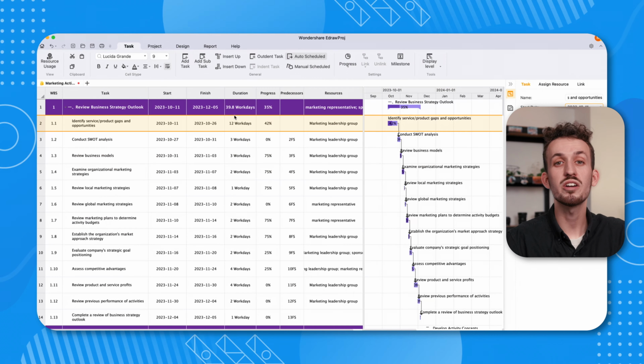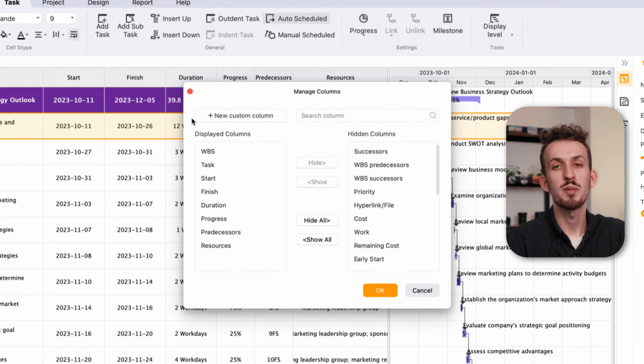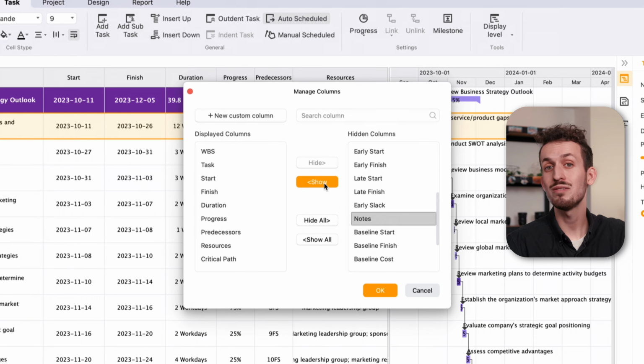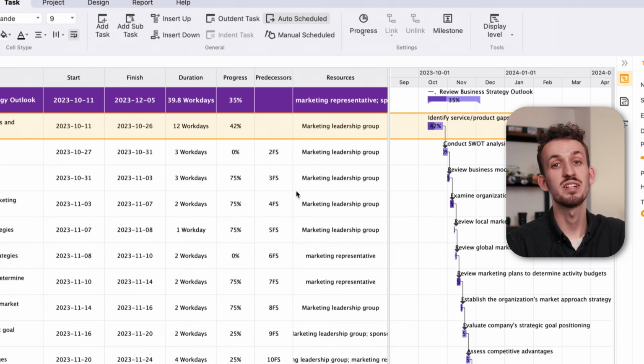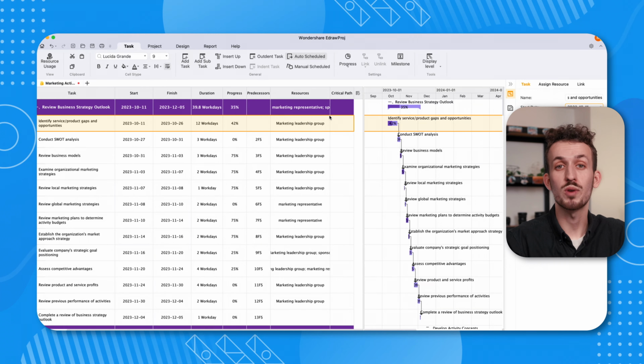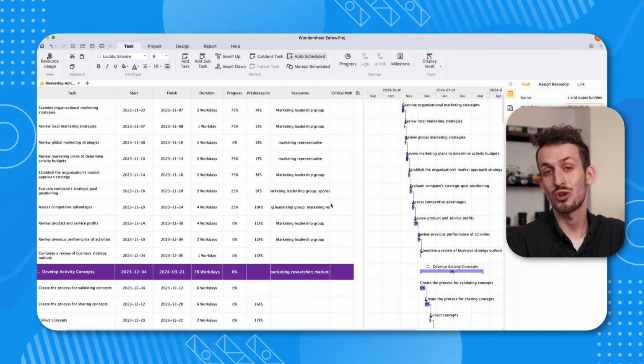Step 1. Right-click on the menu bar of the progress sheet and select the Manage Column option from the list. Step 2. You will get a small pop-up screen from where you will find several displayed columns and hidden columns. If you find the critical path in the hidden section, click on it and press the Show button. Later tap OK and it will start displaying as the column in the progress sheet. Step 3. Swipe right and access the critical path so you can witness your attention-needed projects.